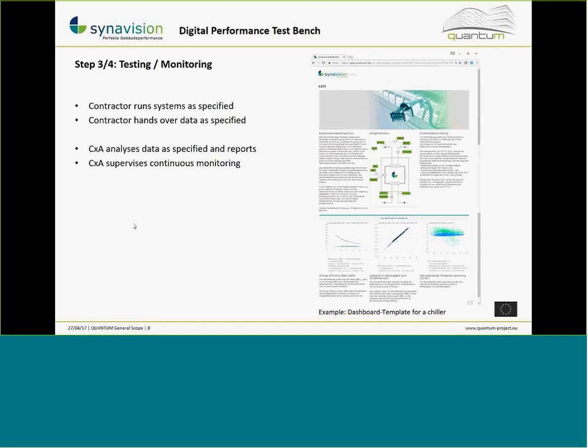The contractor hands over the data for the testing period from the building management system as specified. Then the commissioning authority and quality manager create a report. Within the Test Bench this is done within the same document — you put the data in and there is a powerful, simple mechanism to link specification and operation data. You immediately get a report showing: this is the chiller, this is the specification, this is the data received, and the tool shows exactly whether all items have been met.